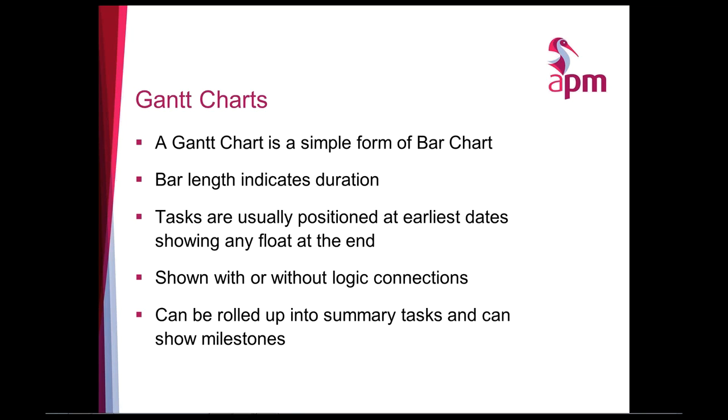On quite complex programs, if you show it with the logic, because some of the logic might go across the page, what you end up with is these black lines all going through your nice colourful bars, and it looks quite messy. So often on big projects you show it without the logical connection just because it's presented more clearly. We can also roll the Gantt chart into summary bars, and we can also use milestones as well.